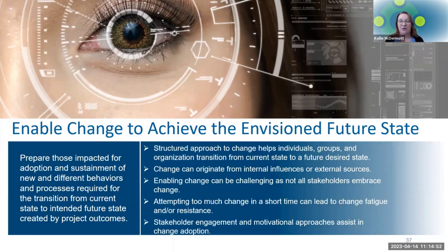You should plan for the challenge of enabling change, as not all stakeholders are going to embrace that. You're going to have some resistance. That's just natural. You should know that attempting too much change in a short time can lead to change fatigue and that resistance. And you should plan and implement stakeholder engagement and motivational approaches to assist with the change adoption.